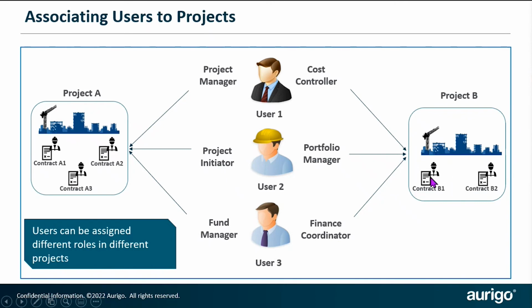If they are on a contract, then they automatically are added to the project, or invited as a user into the project. You can designate what roles they'll play within that project, including multiple roles, as long as at the enterprise level, the administrator has assigned that user those roles.